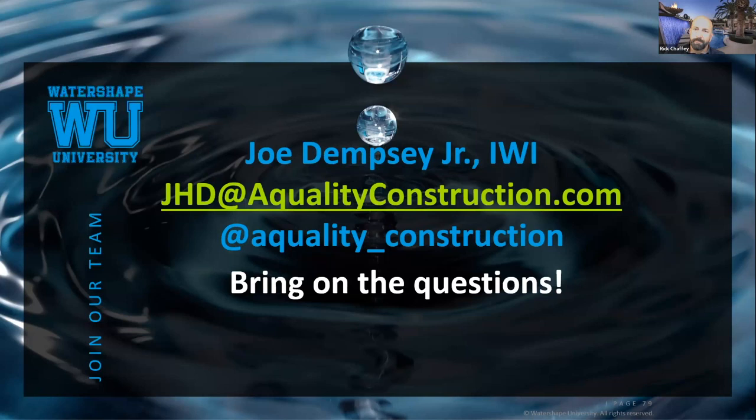So yep. What was your time frame on this, when you guys started to finish, regardless of the design process, but when you guys broke ground to finish, what was your overall schedule? Well, there's a lot of other work going on. So it probably took us 6 weeks to get concrete placed. It probably took Luke and Amy 4 months maybe to get all the tile in with Twinscape, because they had to work in conjunction with Twinscape. There were a lot of other contractors around the pool that had breaks in the work that we could do. So, I mean, it's been 2.5 years and he's just about to start swimming.